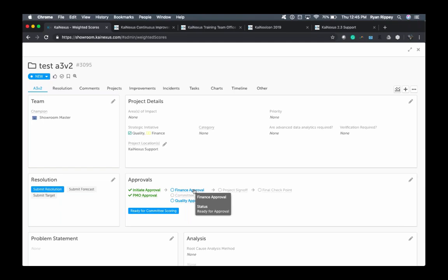In addition, any updates that you're doing within your milestones are now going to count as an action for your last updated date. That wasn't the case before, so any changes to milestones will adjust that as well. And then the last thing that I want to talk about is we also now have set it up so that milestone approver roles are going to work in conjunction with your role-based permissions.